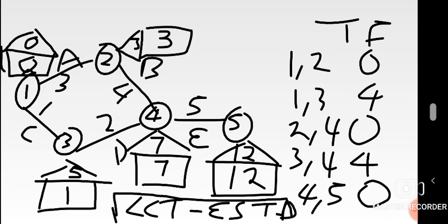One thing about total float is that it can also help you identify the critical path in its own way. It's actually a measure of helping you identify the critical path. Wherever you're seeing zeros, that was where the critical path has passed by. You can actually prove that. So it's just another measure to test or prove that your critical path is correct. Total float measure, and that's this video on total floats and free floats.